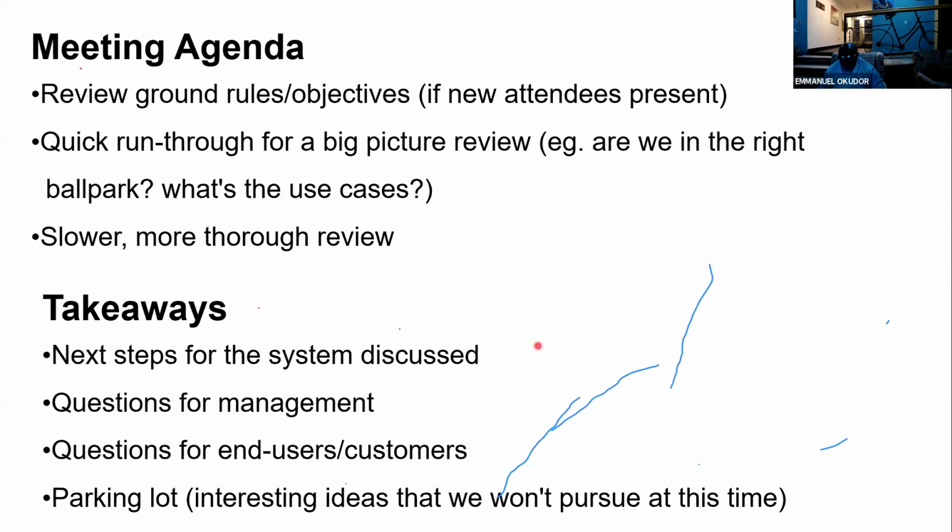Now, that 3 is expensive. The project sponsor might not have the budget to add 2 more. So it's very important for them to go back to management. There are some recommendations that even at the PHA workshop, we cannot take a decision on.